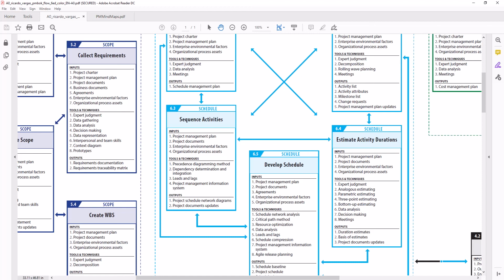A requirement should be complete, correct, and consistent. Then, similar to rolling wave planning, you also have progressive elaboration. That means when you're collecting the initial set of requirements, you have only some information, but then you elaborate this in more detail as you go through the various phases of the project. This is progressive elaboration.